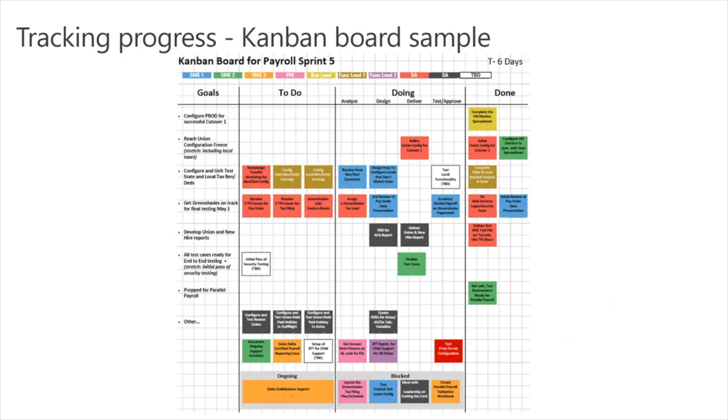They've been doing these 4 things for a long time. They're not making good progress. They're not able to work on 4 things simultaneously. I'm going to take away 3 of those and put them in the to-do. I'm going to say, finish this one, then I'll give you the next one, then the next one and the next one. I'll feed you it in sequence so we can get the right level of progress, right?